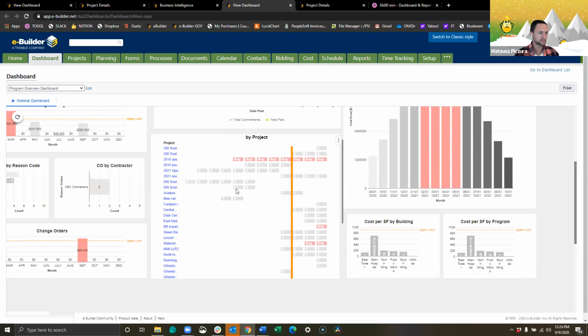The other use case for the schedule visual is, and this was the case in my previous experience, our organization had an internal team that was responsible for activating spaces. This was our IT team. And oftentimes we ran into situations where, let's say we didn't have enough resources, we had too many activations at the same time, and teams would realize that, hey, we need more people. Sometimes, quick decisions had to be made to shift the schedules or to add more resources.